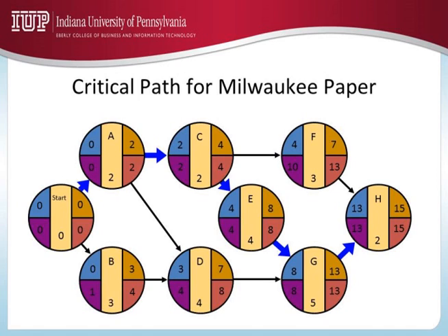So if I ask you a question like, is it okay to start activity F in the 8th week? No problem. The latest start time is what you would look at, 10. If I ask you, is it okay to complete activity F on the 11th week? What number would you look at? I asked you, is it okay to complete F at the end of the 11th week? No problem. You're looking at latest finish time, 13.